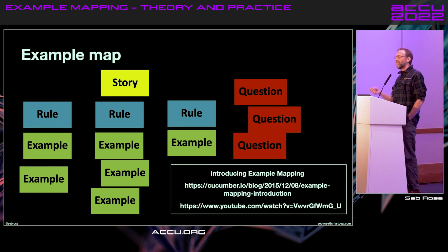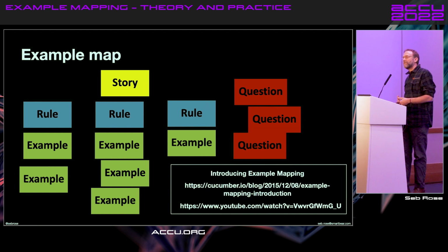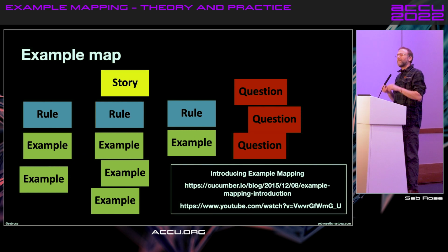So in Agile, a lot of increments of functionality are delivered underneath a heading of what's often called user stories, and he got them to write the title of the story on the yellow card, and then he asked them to write the acceptance criteria that they'd identified on blue cards, and he spread the blue cards out underneath the story card, and then he invited the people in the room, and in that particular situation, it was what's a group of people known as the Three Amigos, which is essentially a representative sample of people with the development perspective, people with a test or QA perspective, and people with a product perspective.